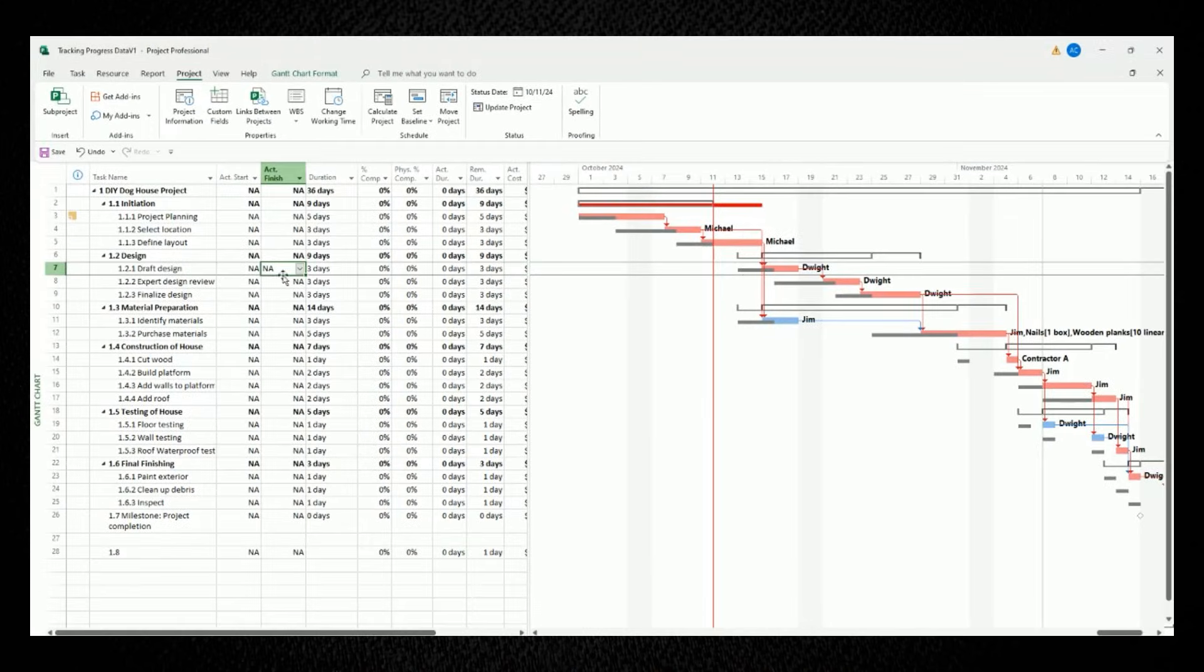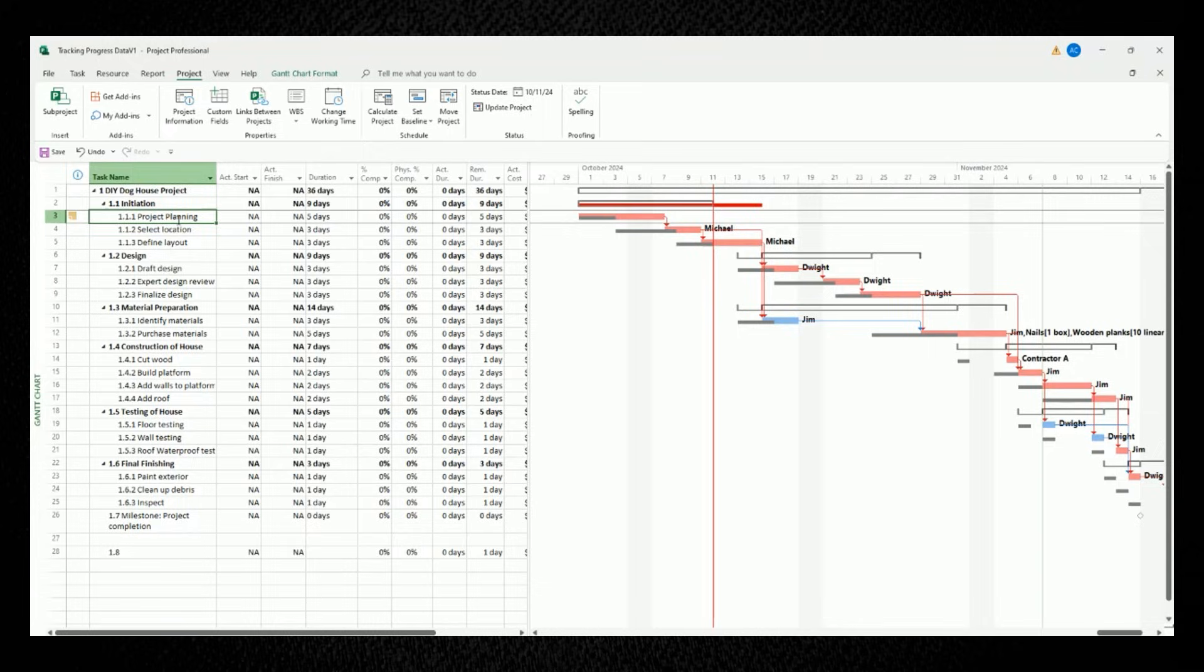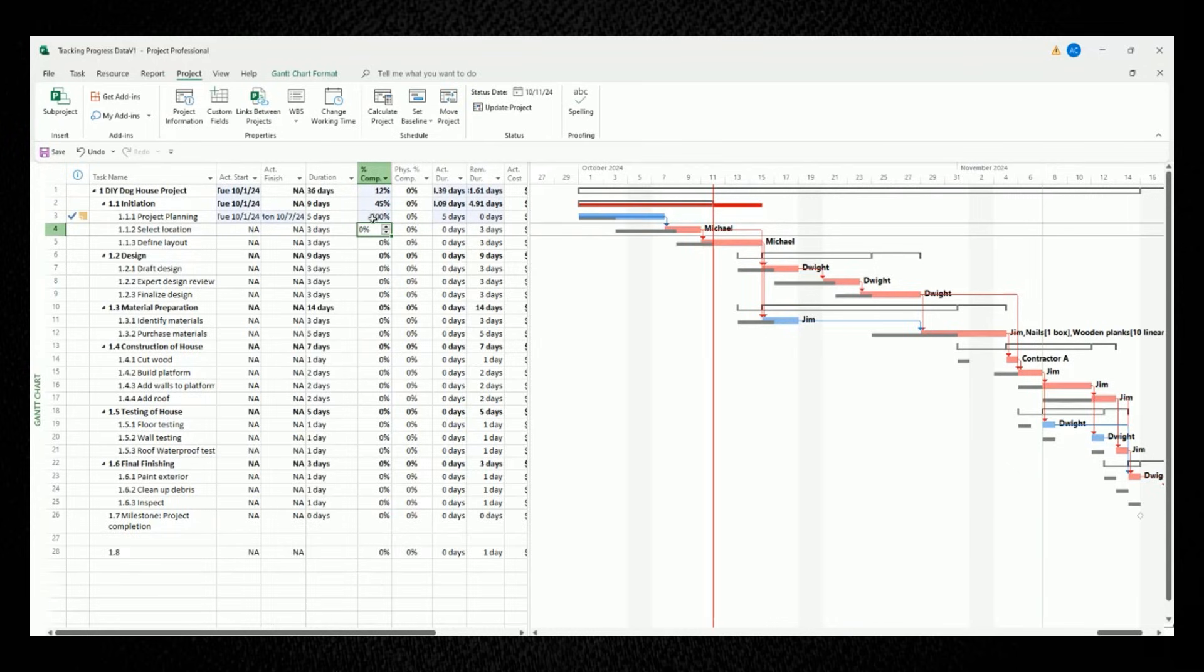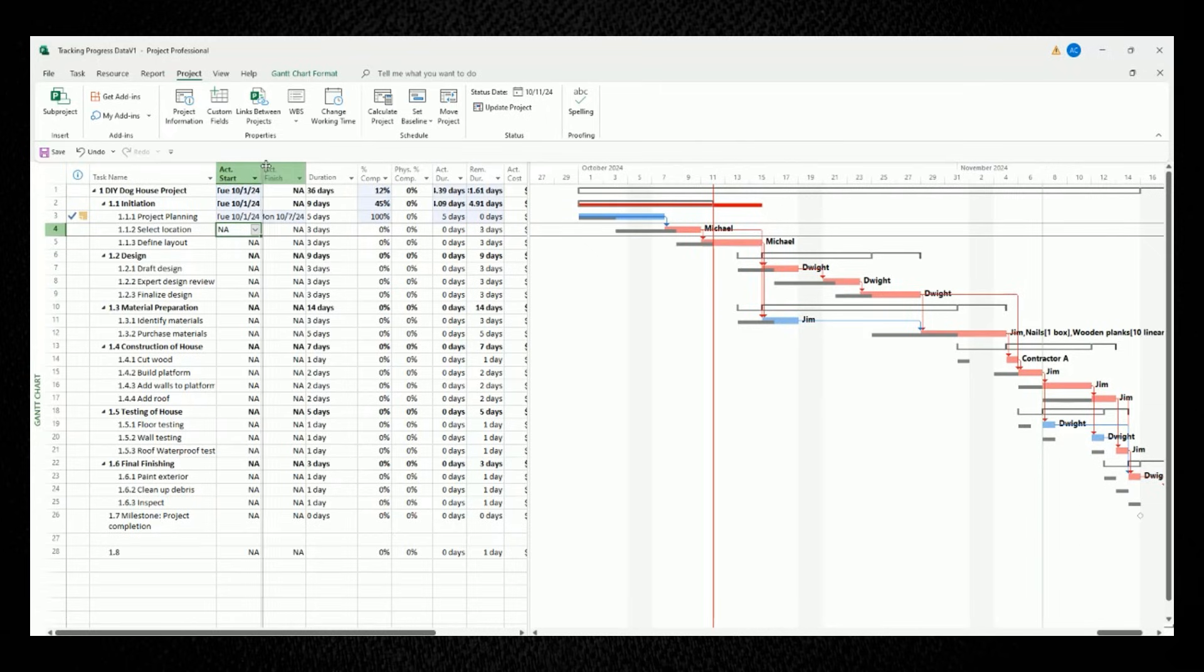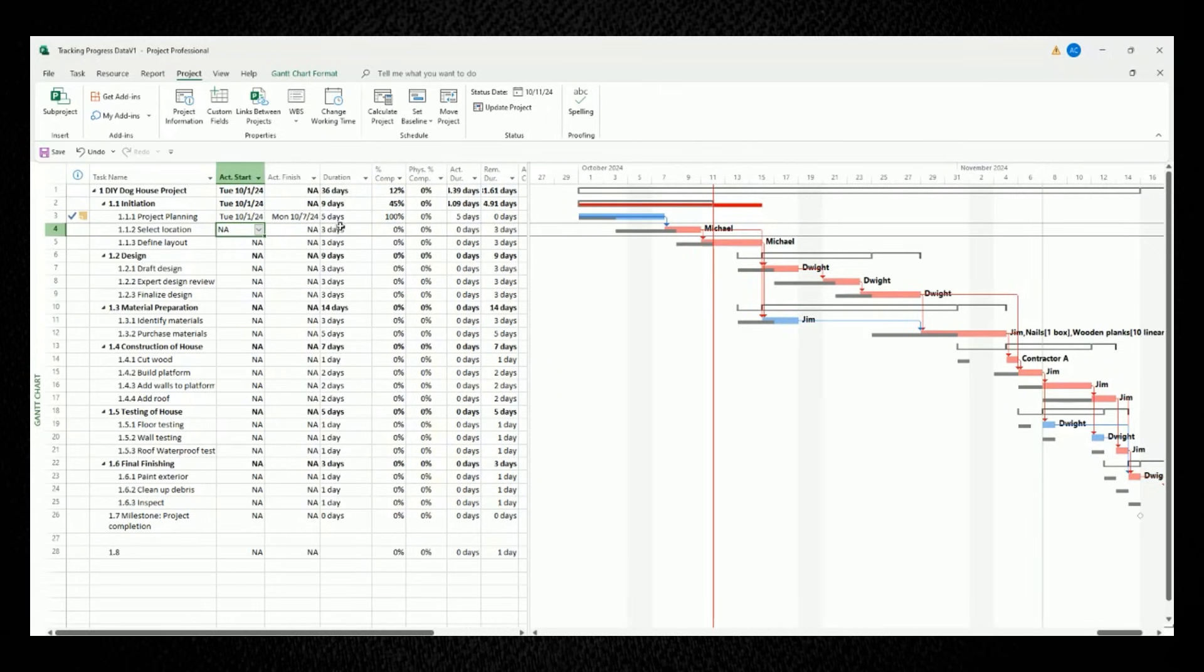So to mark this task as completed, in the percent completion column, type in the number 100. And when you do that, you'll see that its task bar in the Gantt chart has turned into a blue color, showing that it's been completed. And the two columns for actual start and actual finish have been populated with the actual dates based on our updated duration.